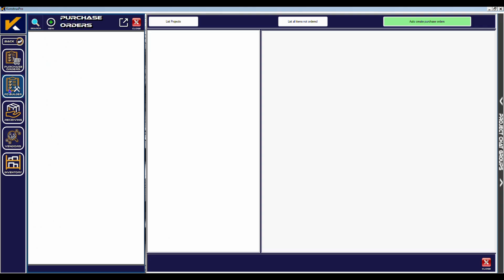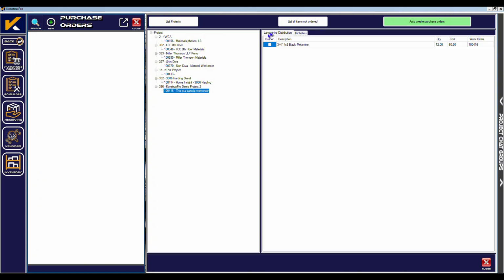There are two ways to list the items waiting to be ordered. You can list all projects that have items to order, then select the work order you are ordering for. Or, you can click on List All Items Not Ordered, and this will bring up all items to be ordered regardless of which project they are for. Today we are only concerned with the work order we just created, so we will list projects then select our work order. When we click on our work order, tabs will appear for each vendor that has items.